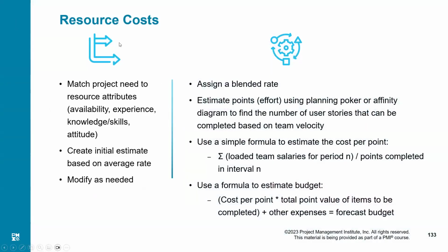Yep. As far as resources are concerned, naturally we add the cost for each resource. But you remember, when we were talking about schedule, we said that we estimate on the average resources and later we adjust the schedule according to the exact resources. So, resource computation, cost computation, and schedule computation must all be done in unison if I want to employ the right number of people at the right time.